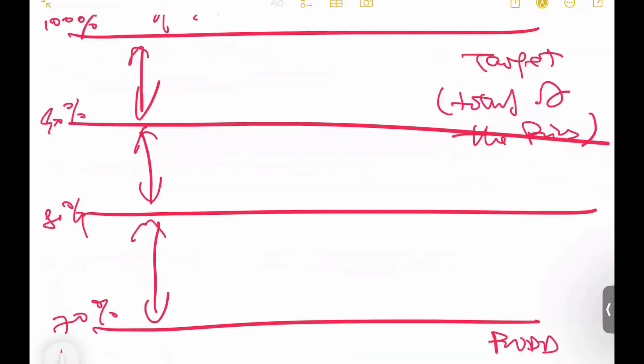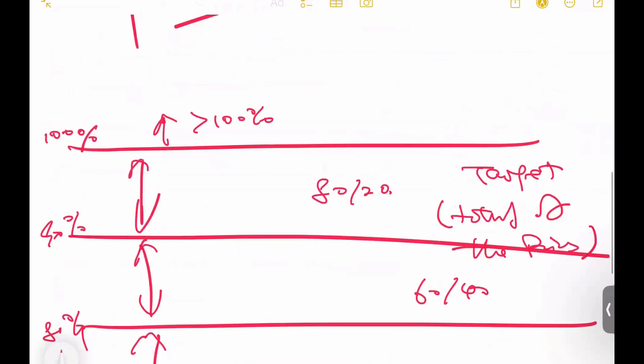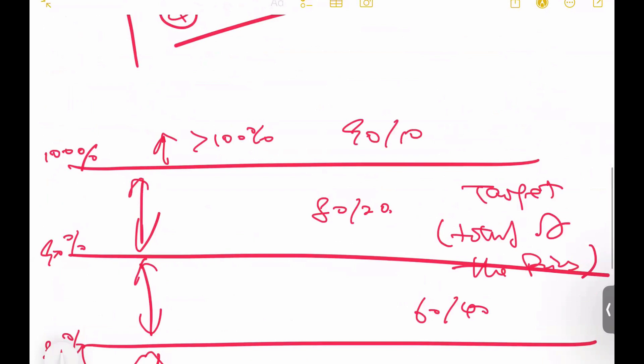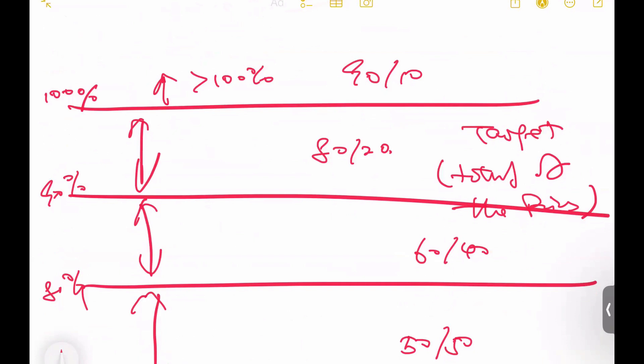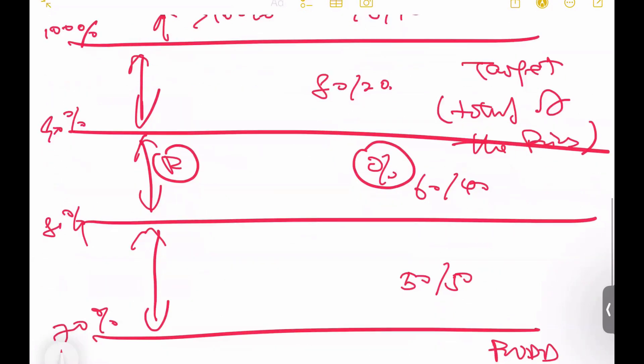Then for each share range, you have one share percentage. Let's say from 70% to 80%, you share 50-50, for example. Then 80% to 90%, you share 60-40. Then 90% to 100%, you share 80-20, for example. And then more than 100%, for example, 90-10. In the contract data, you may specify whether that 90% belongs to the contractor or belongs to the client. We have multiple share ranges and multiple share percentages. The R here is the range. The percentage symbol here is the share percentage.